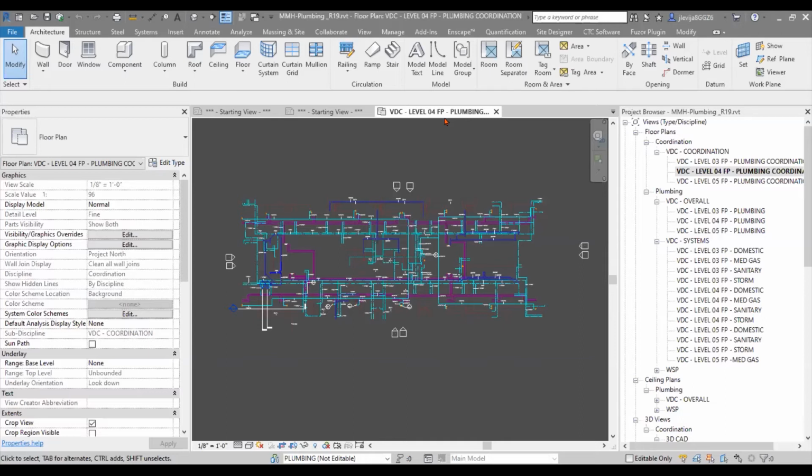Okay, so sometimes some engineering firms, depending on the size of the project, will have them already separated. That works. Other times they're fully packed models with full MEP inside, and we have to cut them up ourselves. So by experience, that can be another couple hours to even a full day worth of additional work in order to cut up an MEP model. We're going to discuss what we do once we cut up that MEP model for this plumbing VDC, and utilizing the MEPPP to help on our end.